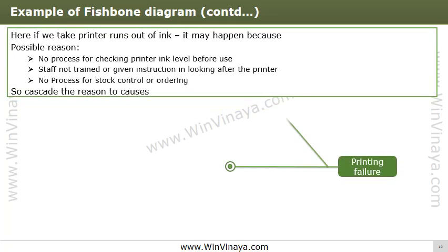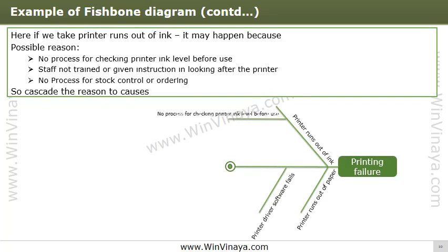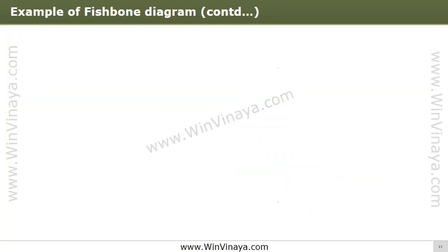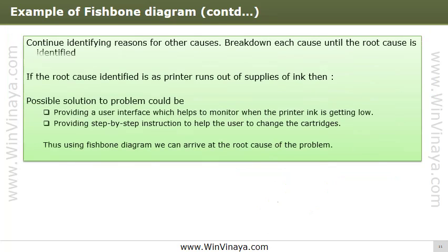For example, if we take 'printer runs out of ink,' it may happen due to: no process for checking printer ink level before use, staff not trained in looking after the printer ink, or no process for stock control or ordering. Finally, you should have a diagram showing all possible causes of the problem that you can think of.